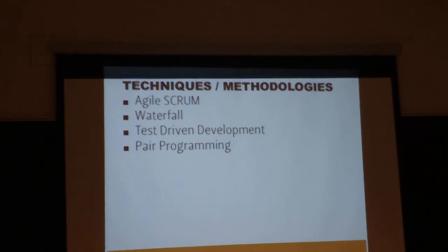Why we don't use that full approach is because most of our clients still require a waterfall approach. So full documentation up front, you go through a build cycle, you go through a QA cycle, and then you deploy it after. Could be 3 months, could be 4 months, some of our projects. Some of them are nice and short.